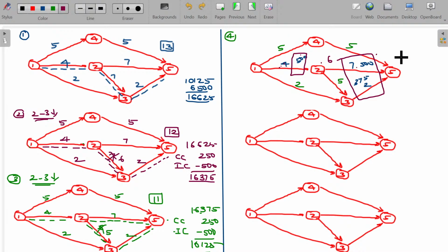Okay. Now in the first option my cost is only 500 rupees. In the second option, to reduce 2 to 5 I need to spend 500 rupees. To reduce 3 to 5 I need to spend 375. So it costs us overall 875. So because of that reason, the cheapest one being reducing what? 1 and 2 only. Reducing 1 and 2 only is logically correct.